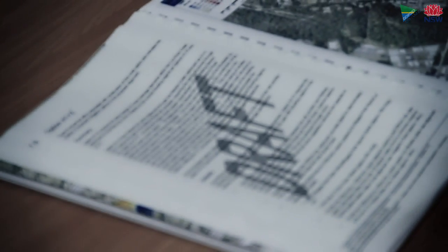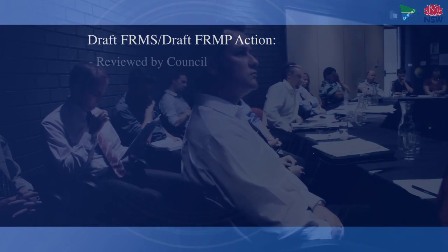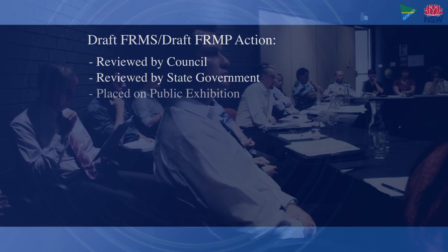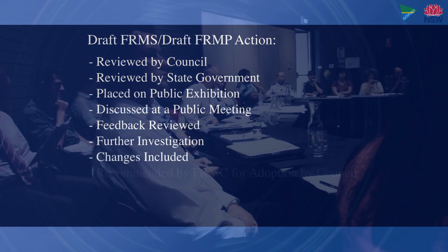Any comments and suggestions as a result of the public exhibition need to be reviewed and any resultant work completed. These comments are included in the appendices of the documents. All things going well, the draft can be finalised and can go to the Floodplain Risk Management Committee to be recommended for adoption by Council.